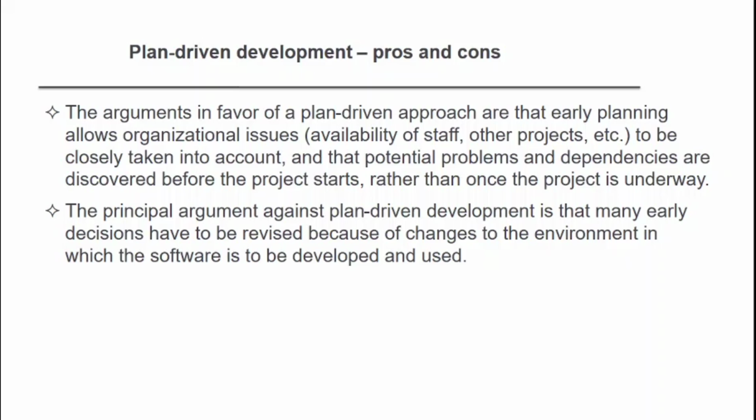When a civil engineer bids for the development of a road in 2020 and there is a rise in the market price of steel, cement, etc., he may charge extra when submitting the bill to the government. So the cost has increased due to this problem, and he can claim the amount.